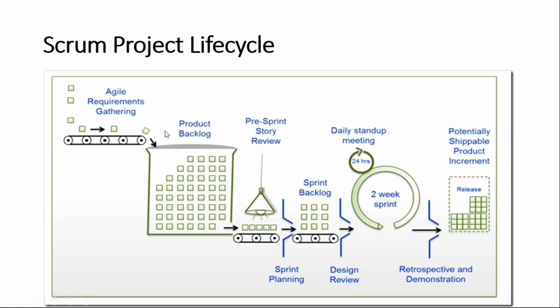Suppose I have made a ranking. There are 100 requirements, and the very first 10 I'm working on are the ones we have decided are the most important. We have started off. Then we realize that requirements 30 to 40 don't hold good and are going out. Rather, 20 more requirements have come in, and we again do the ranking.